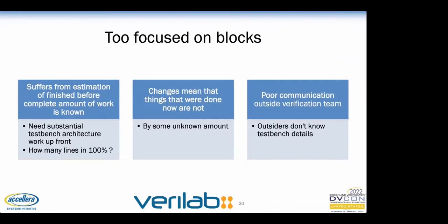When the inevitable changes come, all the architecture and estimates are now out of date and not useful, or the work has to be repeated. It is appealingly simple to take all the blocks of the test bench, like the monitors, drivers, sequences, checkers, and coverage points, and then estimate how long each of those should take to implement on their own. Experienced engineers may do a good job of estimating effort for blocks, especially if they've done something substantially similar in the past. However, problems often arise when we're trying to communicate our status.